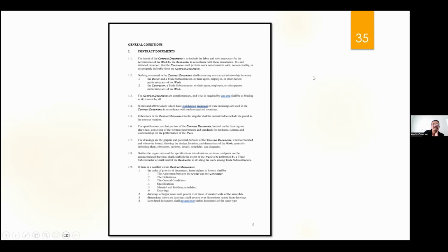Question for you, Kevin: when you have a change order that you need to do, what do you do for the paperwork to keep that clean? Well, so change order. Now, there you can Google change order form. So what you'll do is the homeowner comes through and says, "I want granite countertops." Okay. Now the contractor will fill out a page that says to the owner that we're making this change. I'm going to change the top from laminate top to granite top, and here is the cost. And if we agree on this piece where there's mutual consideration, you're going to get a granite countertop. I'm going to get some more money. If we can agree, let's sign it, and that's it. And that becomes part of the contract.